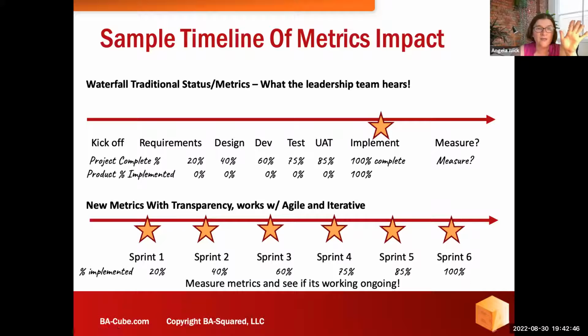Think about this. It could be percent of scope, but what's really nice about this is your scope of your project changes. And I really like to think of scope as the goal. If I'm trying to get to 80% self-service and 20% calls instead of 80% calls and 20% self-service, my project is done when we've figured out the features and tweaks to features to get to that number, not when I've implemented certain technologies. Are you with me on that?